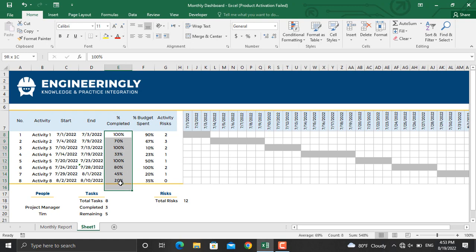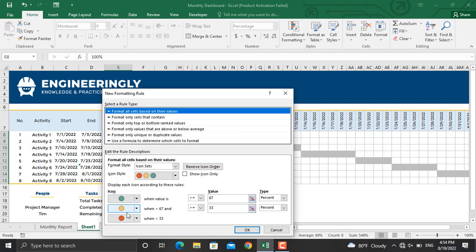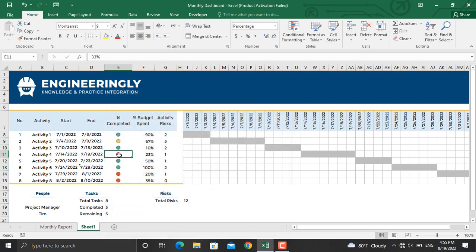Next, to add the traffic light signals, go to Conditional Formatting, then Icon Sets, then More Rules. The three traffic lights are selected by default. I'll only change the values and types. The type is percentage — when it's greater than or equal to 75% it should be green; greater than or equal to 50% it should be yellow; below 50% will be red. I'll check the option to show only icons and not the numbers, then click OK. Now 75% shows that color, 90% shows green, and 15% shows red.